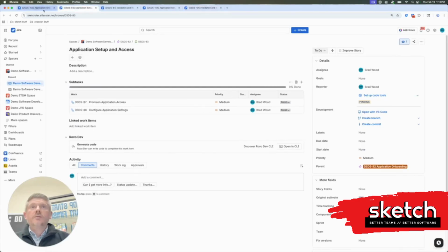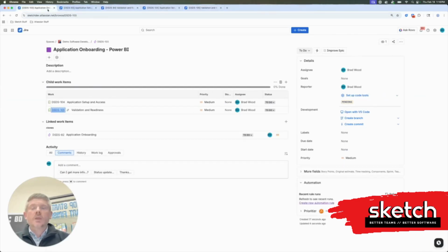Through this process, we can copy a number of fields that we need. So description, due date, summary, which we saw we copied and appended. Date fields, for example, can be set dynamically, so you can actually do some math to say, like, set the due date 1 year in the future, or whatever you need it to be. The exact fields that you copy through this process are entirely configurable and are going to depend on your team's unique needs. This automation does not have to be manually triggered either.